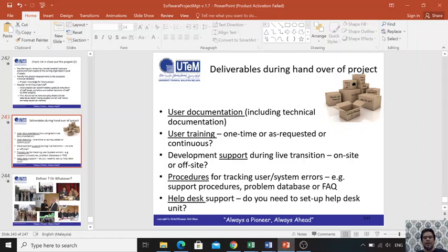You must prepare or reserve two or three staff who can support the user at the site, maybe within 3 months or within 6 months, so that you can make sure the system works accordingly. And when the user has problems or confusion while using the system, we can support immediately. We cannot delay the issues or problems.